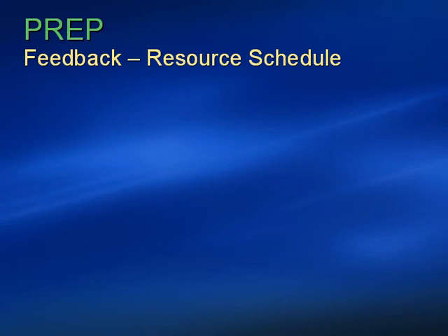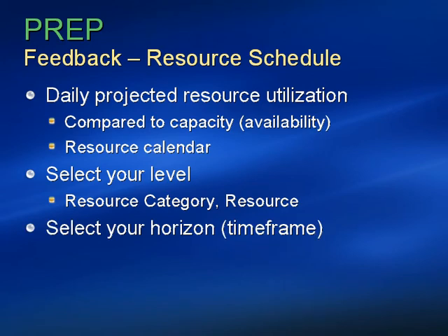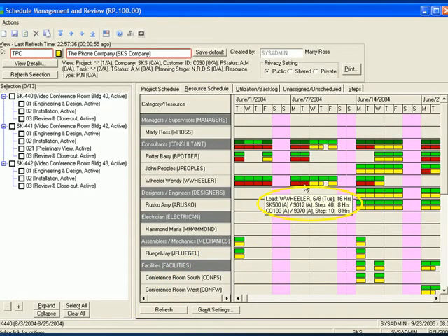If you're a resource manager, PREP's there to help again by giving you the tools to analyze daily forecast utilization by resource. First, decide if you want detail or summary information. Then select your time frame. This is a different tab on the same predefined view we used to see the project schedule. We configured this tab to comfortably show 3 weeks worth of data. Notice that the tooltip is showing us that Wendy Wheeler is overloaded on June 8th as a result of having been scheduled to work on 2 different projects on that day. Again, be sure to take a look at the demo video on scheduling to get a closer look at the functionality on this tab, as well as how to construct your own views.